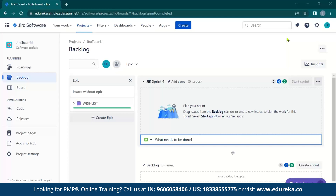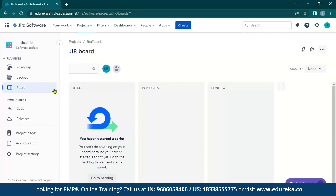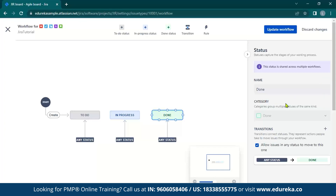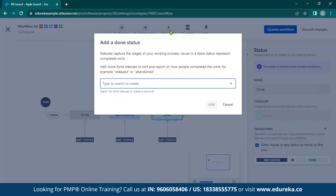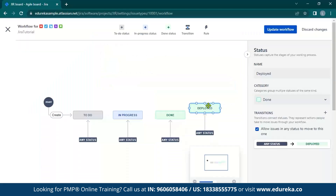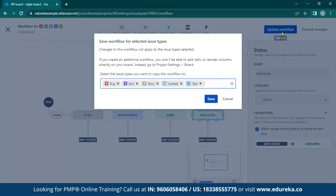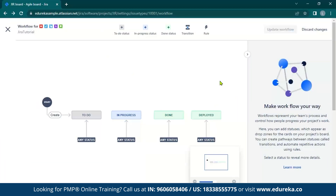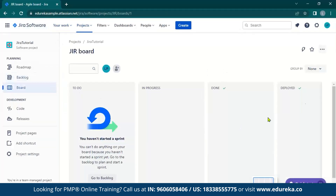Now we will see how to manage workflows. The first thing you need to do is go to board, then click on the button and select manage workflows. Over here, you can see the phases your business is currently going through, and you can also add new phases. Let us add another done status — I would like to add a deployed phase for the project. Once done, click the add button and you can see that the deployed phase is now added. You can then update your workflow and save it. After saving, exit this interface, head over to board, and you can see the deployed phase for your project.